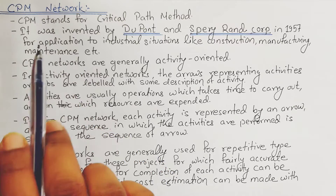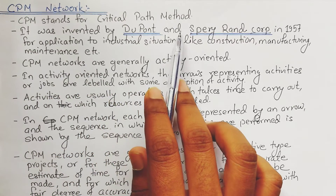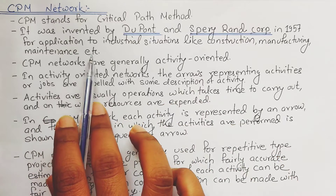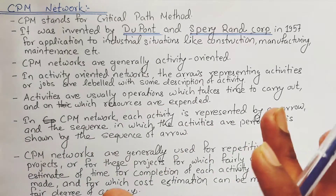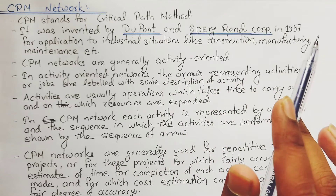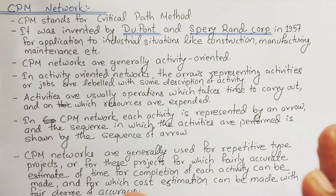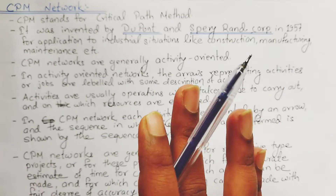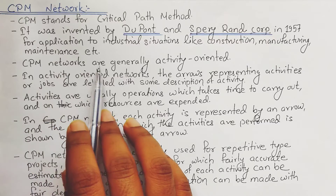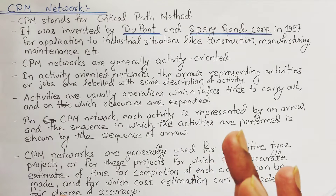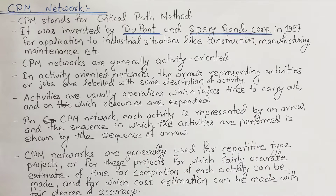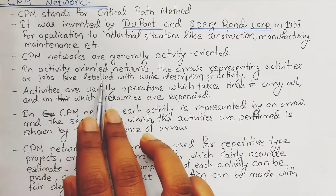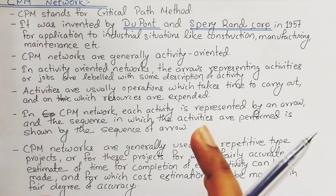CPM — Critical Path Method — was invented by DuPont and Sperry RAND Corporation in 1957 for application to industrial situations like construction, manufacturing, maintenance, etc. CPM networks are generally activity oriented, meaning the arrows representing activities or jobs are labeled with some description of the activity.